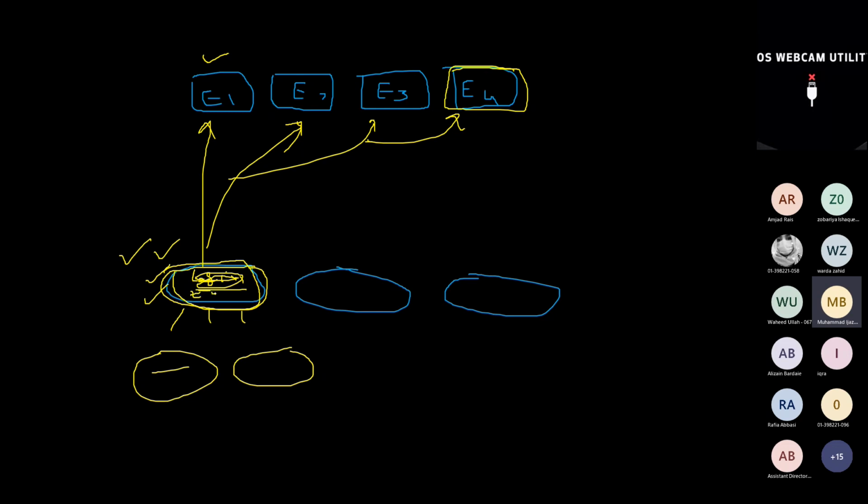This is one user story, right? Don't you think it is related to all of these features or epics? So what do we do? We combine these login details, and we say that these are themes. We combine everything which is common to all of the epics. We call them a theme.